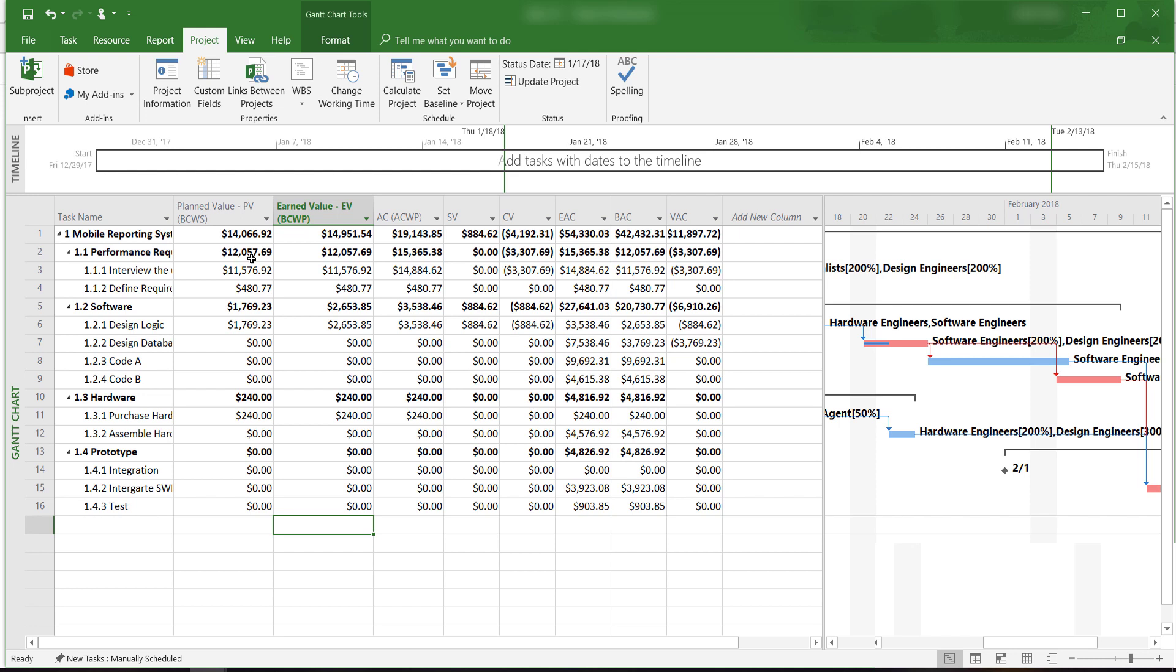Take a look at this report. By January 17th, we plan to spend about $14,000. So far, the earned value is about $15,000. Earned value can be interpreted as the planned value of the work we have actually completed.